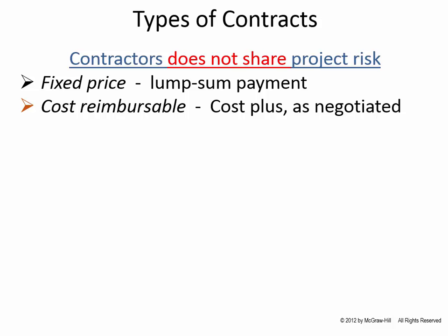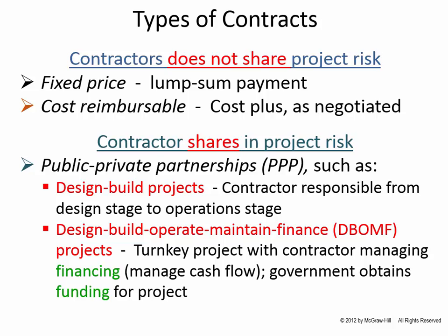So to get around those two extremes, more and more it's becoming popular to try and make the contractor a partner in the project. Rather than an outside party, if you bring them in so that they share the same risks and they share the same benefits as the people who are going to own the project, then they have an incentive to do quality work but also save money. So we'll talk about a couple of different iterations of what's known as a public-private partnership.